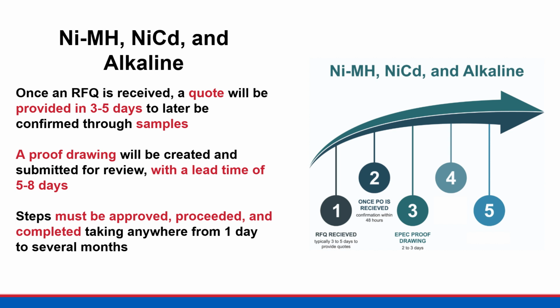Once approved, we will proceed with the determined number of samples, and the lead time is typically 10 weeks. The customer receives the completed samples and will need to perform their review and/or testing to provide formal approval to proceed with the production quantity.